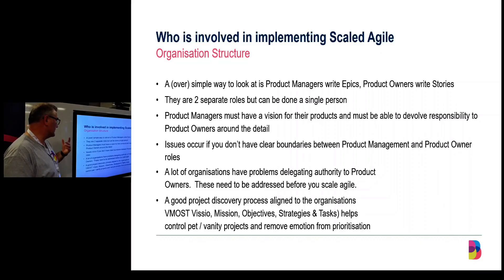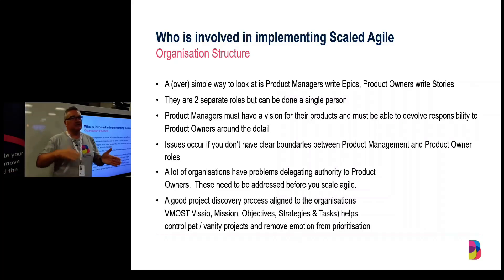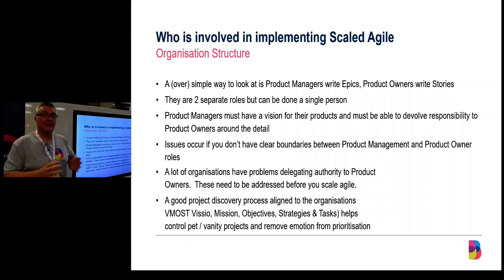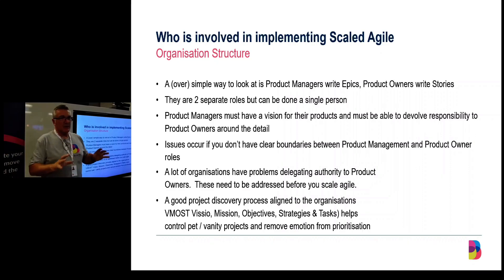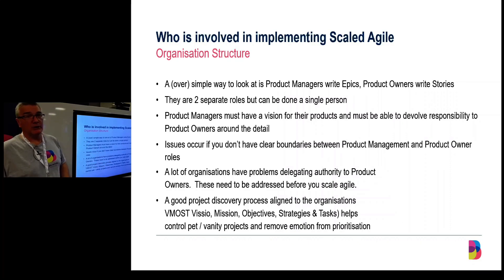A product manager can also be a product owner, and I've seen that a few times. It does work if it's a small organization — in that case the product manager does tend to allow the product owner role to function. But it doesn't scale, obviously. The key message at the bottom: the product management team should be focusing on the company's vision, mission statement, and objectives — high-level stuff. Let the product owners worry about how you actually implement that change. Product management: strategic. Product owners: tactical.